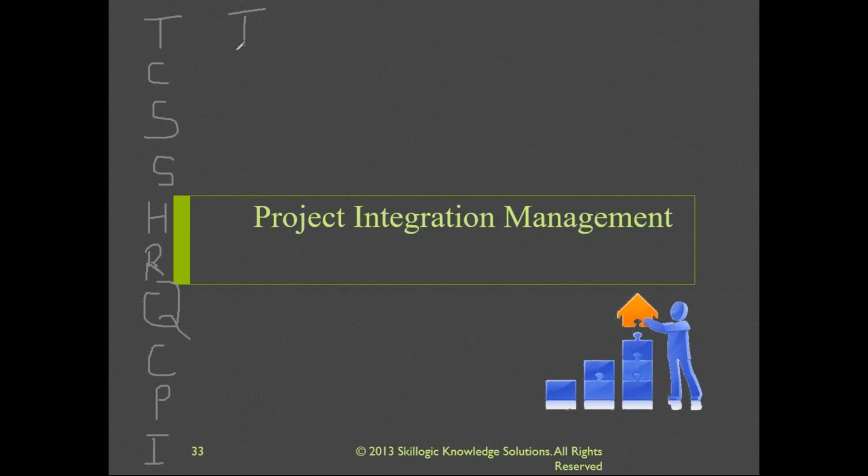The project started with initiation, in which the project charter was prepared. Project charter is all about the project business case, why the project has to be done. Then planning was done about carrying out the work in such a fashion that the entire island is built with natural material. While planning was going on, execution was started without planning being completed. That was one of the risks, that they did not have sufficient time to plan. They had to start the execution quickly because the work had to be done before 2005.